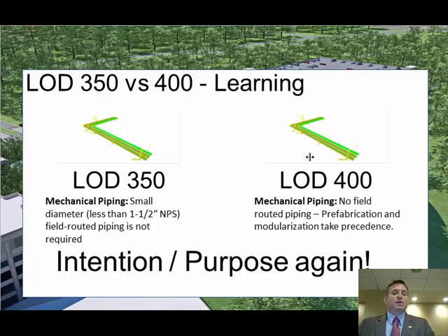And if you take that step and get to level 400, you start seeing huge productivity gains. Because what happens then, you get your fabrication, you get your assembly line. Now, the assembly line, we're not going to roll the building through some other bigger building on a bunch of rollers, right? How do we get the assembly line? It's more of an assembly parade. You walk the contractors in right behind each other. They walk into their area, they install what's there.